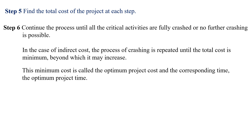In the case of direct cost, the process of crashing is repeated until the total cost is minimum, beyond which it may increase. This minimum cost is called the optimum project cost and the corresponding time is called the optimum project time. This is the procedure for the crashing of a project.